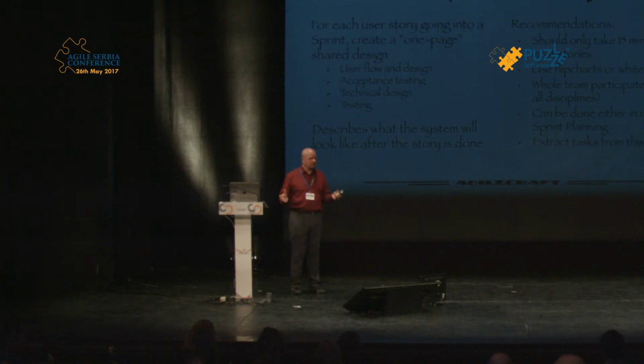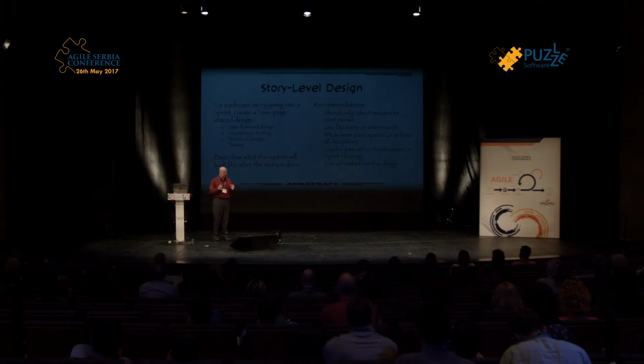Now, if you have a multi-team circumstance, like 5 teams working on the same project, then you have to come up with some tricks like combining members from different teams into a special team that does the refinement. You have to figure out something anyway in those contexts. But if you don't have to go there, have the whole team participate. Don't try to sub-optimize by having just some people, because then they're left out of the conversation. It's no longer swarming.